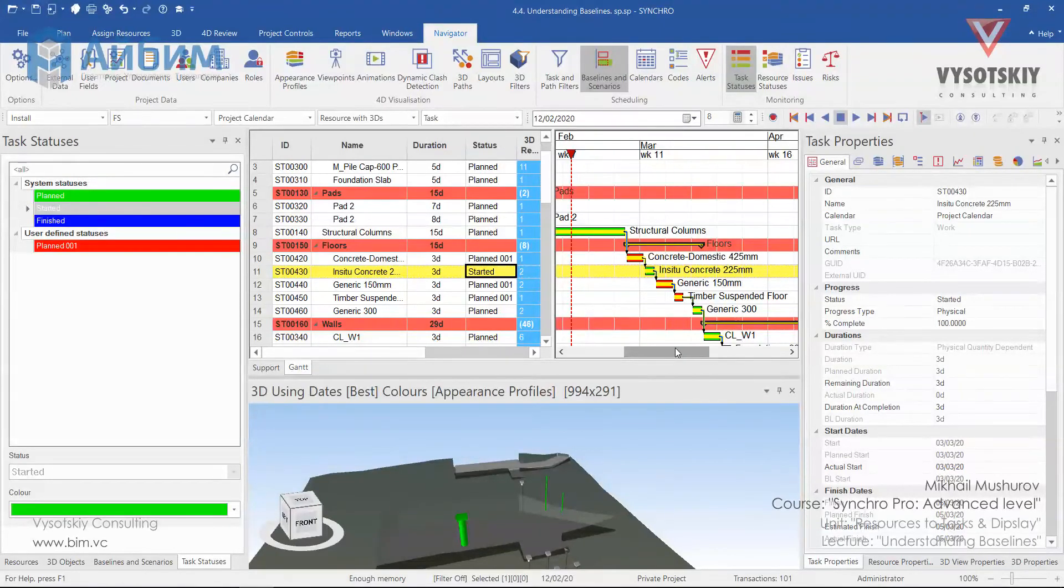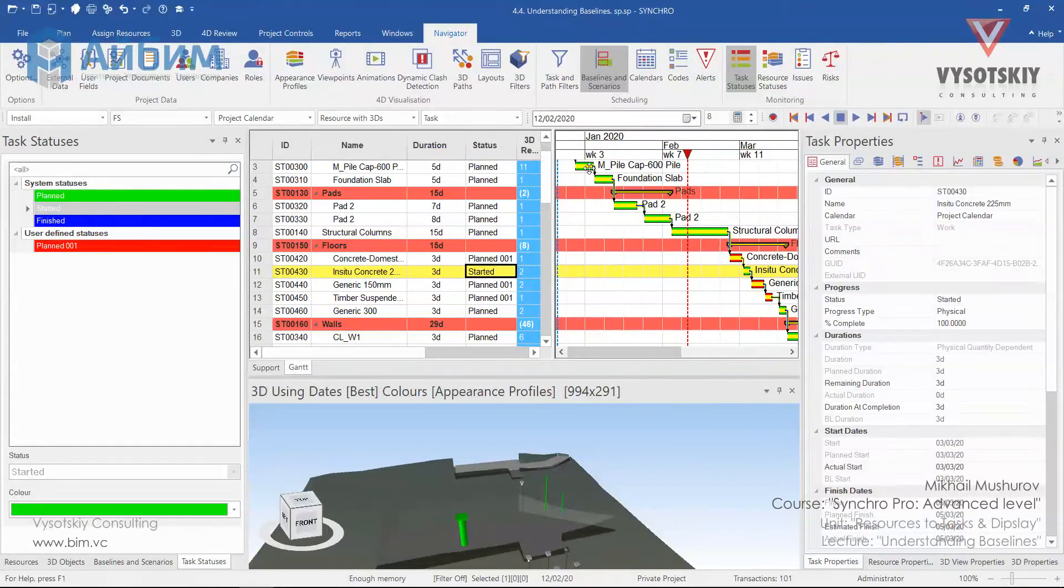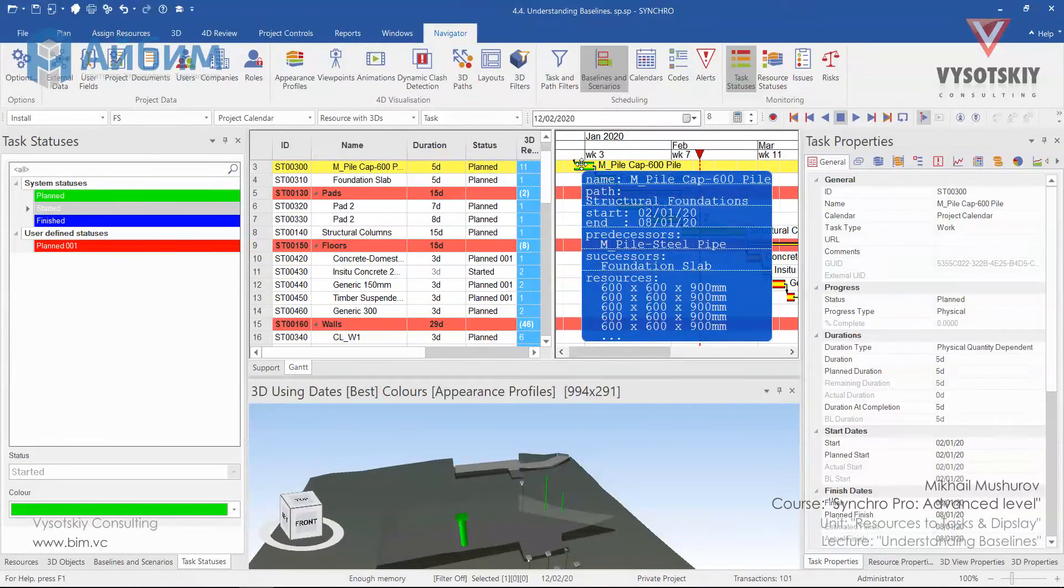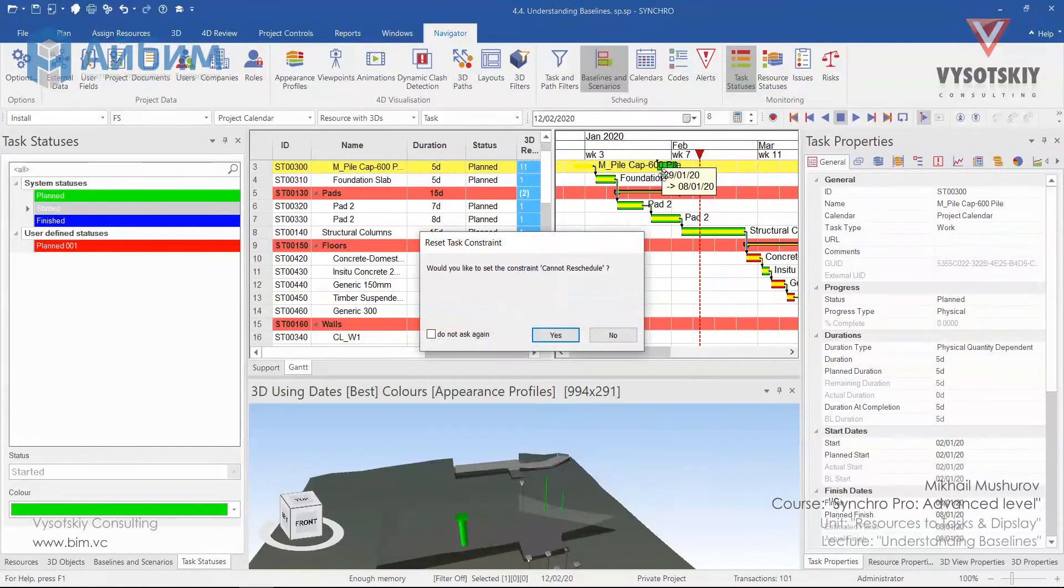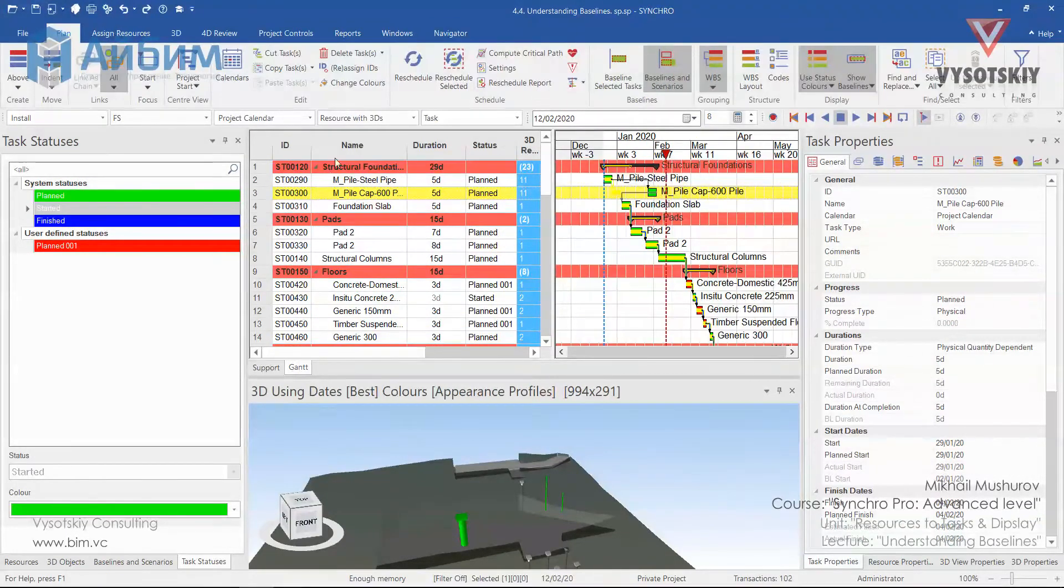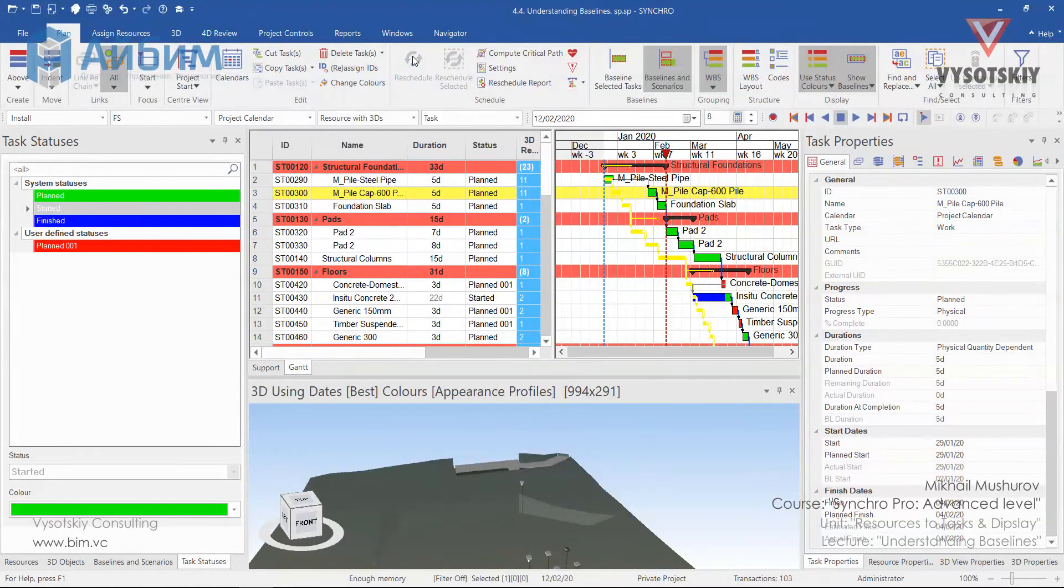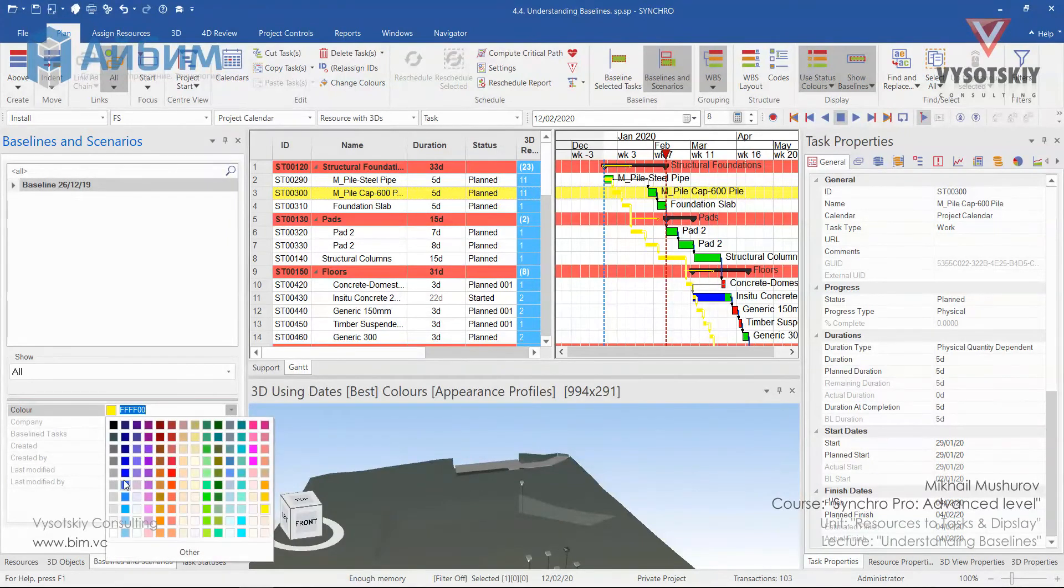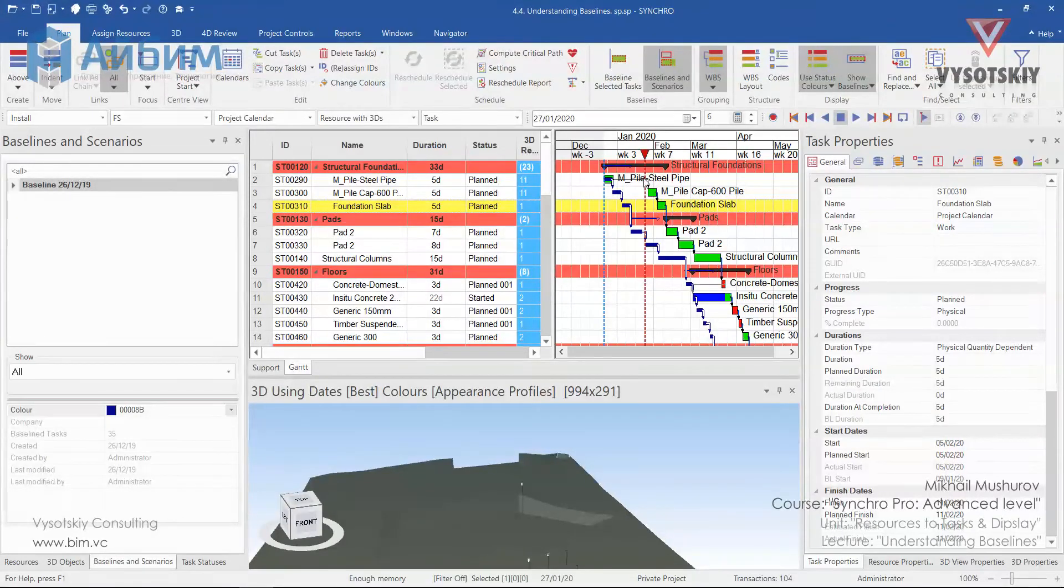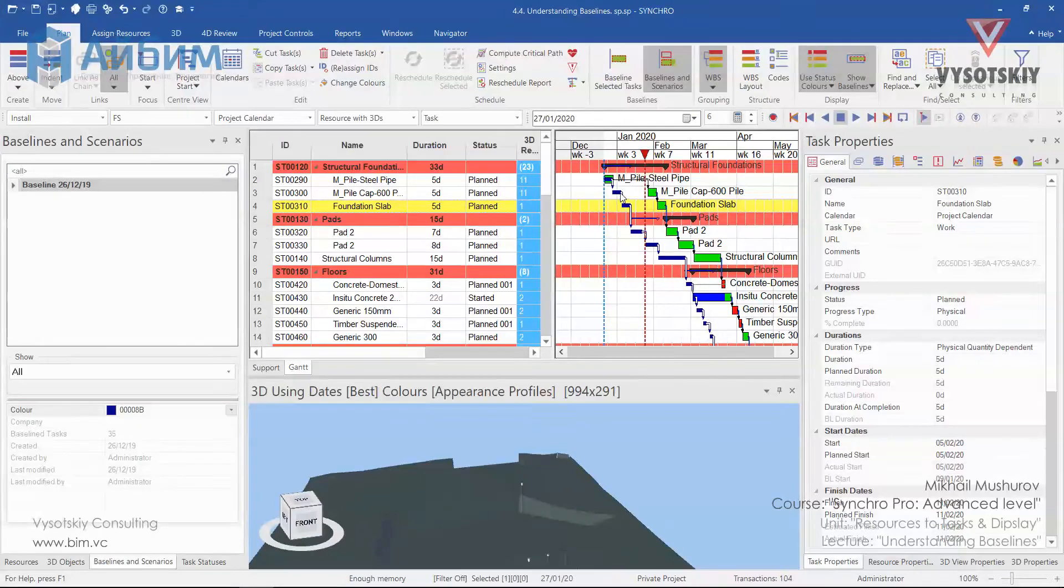Now if we suppose that our pile caps activity has been postponed. For example, let's select the pile caps activity and let's drag the bar to the right. Yes. Then we need to reschedule our project. Click over reschedule. I guess this color scheme is not that good. You see that the reference schedule shifted to the right. So just let's imagine that we have a delay in pile caps installation.